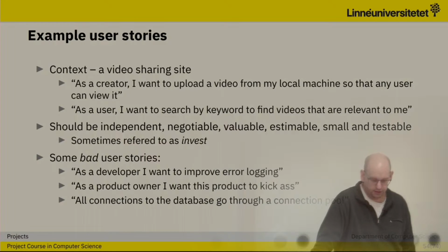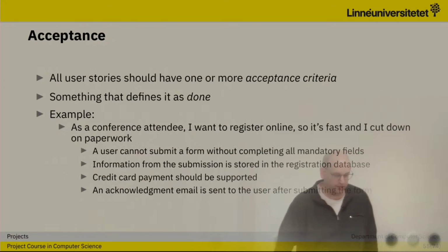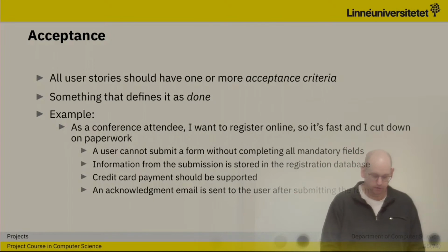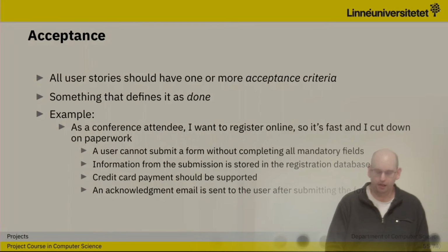Bad user stories then. As a developer, I want to improve error logging. Well, that's not going to give any value to the customer. As a product owner, I want this product to kick ass. Yeah. Or all connections to the database go through a connection pool. Nah. So the important thing is the acceptance, something that defines done for this product.